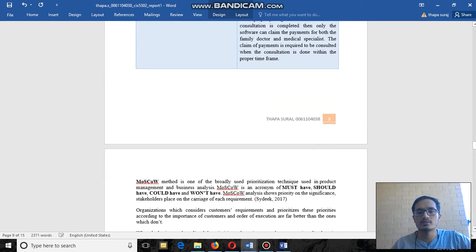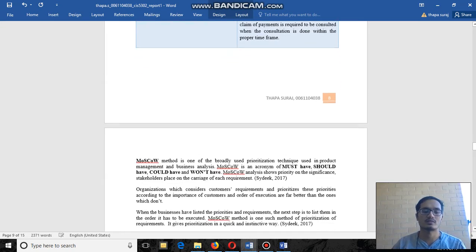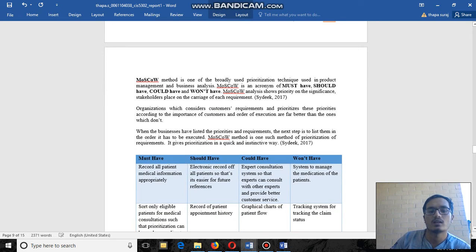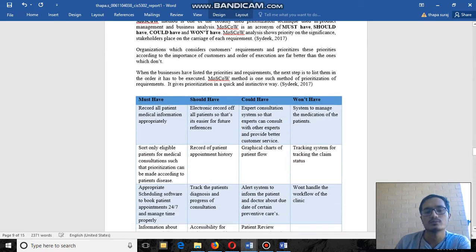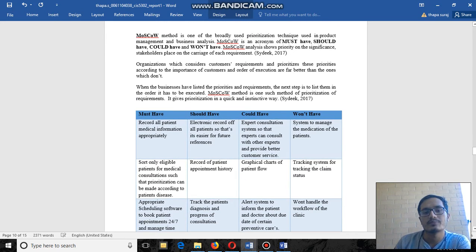After the product backlog was the MoSCoW analysis. MoSCoW analysis is done to know what the new system must have, what it should have, what it could have, and what it won't have. I have defined MoSCoW analysis over here and referenced it again.